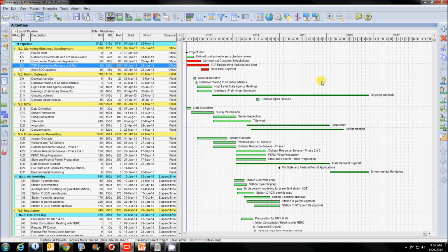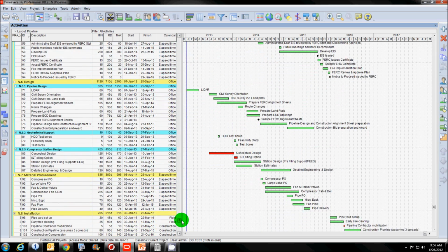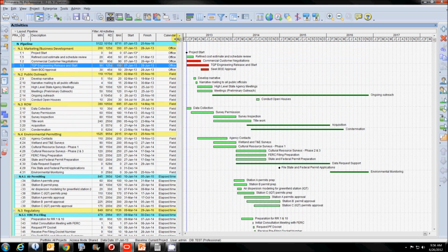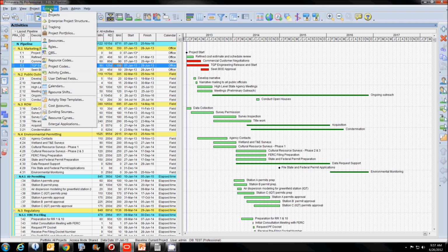Okay, this is our schedule. Nothing special here. What I just want to show you here is that we're using multiple calendars. And I should also stress that this is only appropriate in some of the smaller schedules, say level 2, where you have direct attribution, where we could give each activity a minimum and a maximum. This will not be a problem when you use templated quick risk or something else that doesn't require you to import your ranges.